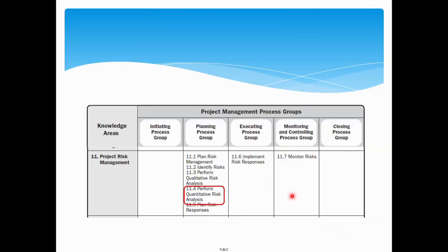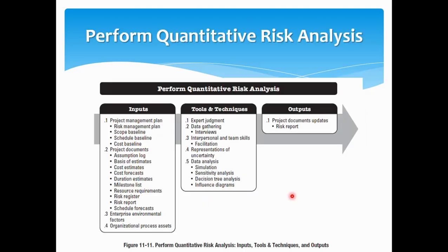So the other thing that you can do for known risk is a quantitative risk analysis. It involves mathematical formulas, where you as a project manager can quantitatively assess certain risk elements and try to give a monetary value to the risks.